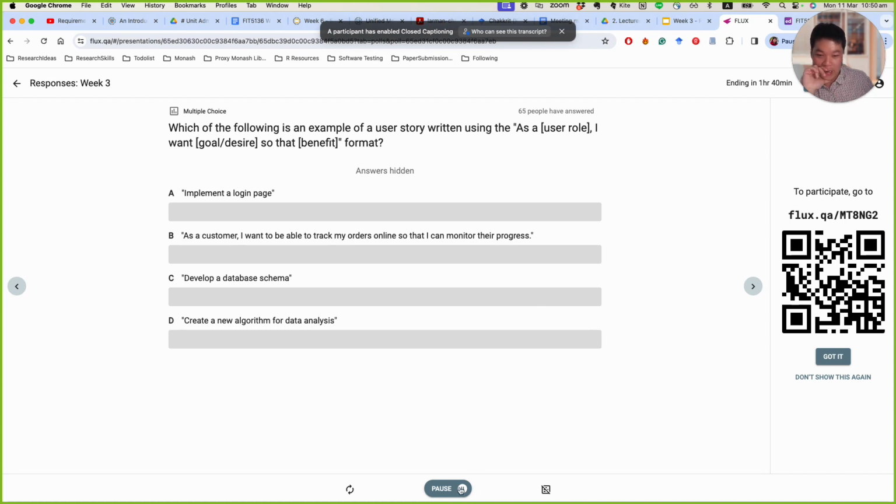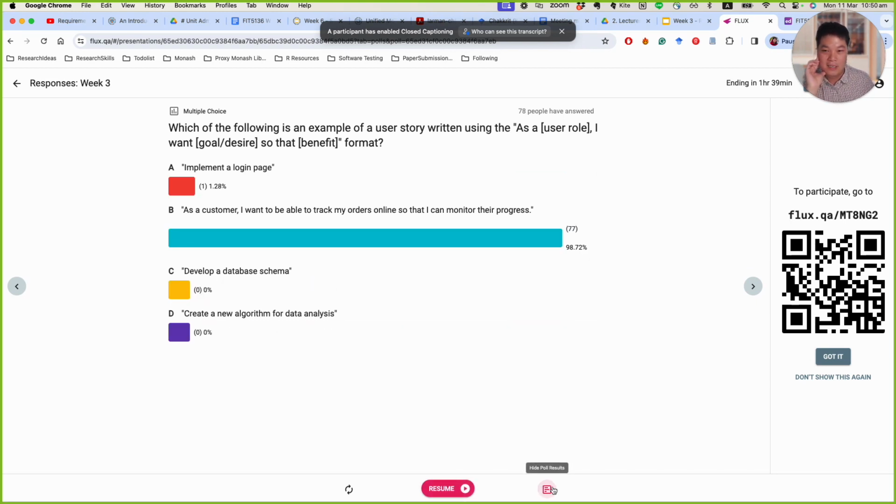Let's try to get 80 people to answer, and then we'll move on to the next question. All right, I'm going to pause the quiz, only this question, in 5, 4, 3, 2, 1. Let's see the answer. The answer should be "As a customer." A user story should be written in this format: as a customer, the user role, I want to be able to track my orders online so that I can monitor their progress. That's the right user story.